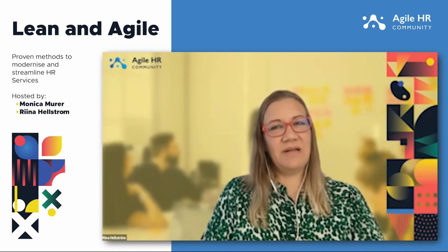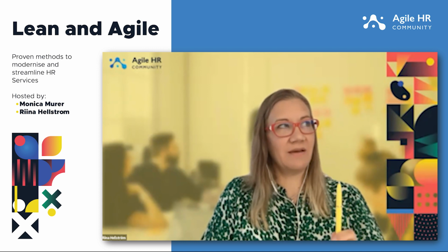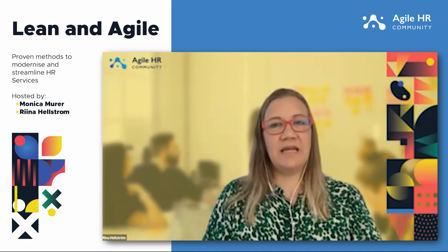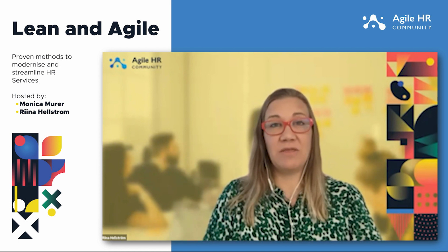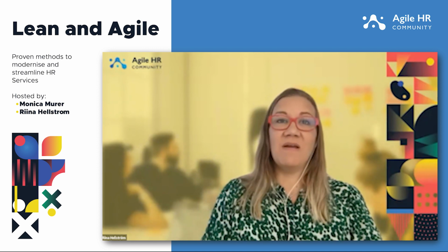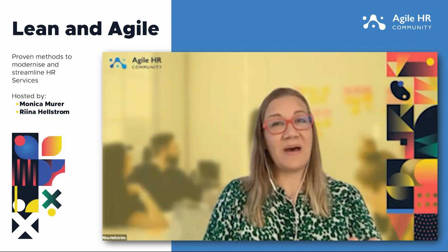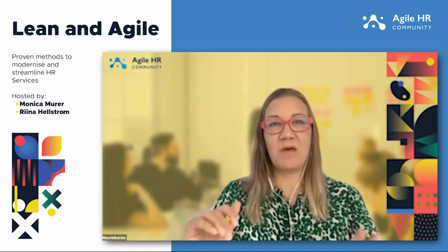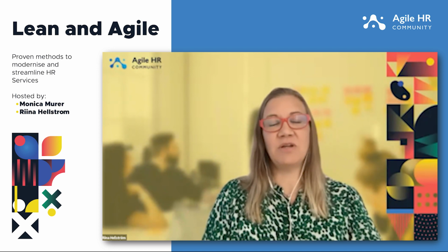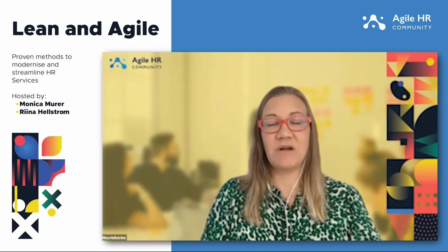Excellent. It really follows those principles. I've got one which I would like to add that is a beautiful example for walking the user's path. Another really different example about using agility in HR services is how the prioritization methods are used in Agile, because HR services also have very many conflicting priorities. It's too much on your table. So you can learn a lot about how Agile teams are prioritizing. Effort-value or MoSCoW are the two methods that I would look into, which are very helpful for having team discussions about where we should use our effort and energy.